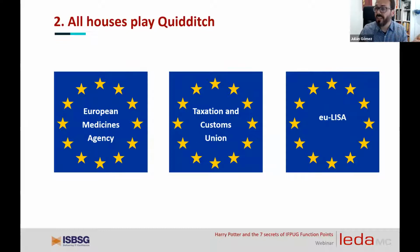I remember, last year or maybe 2018, that in all those tenders, function points are used in a different way in each one, but they are used for three main things. The first one is to calculate the value of the project, to make the estimation of the project. The second one is to select the best provider, the best supplier, to do the development project. And the third one is to calculate the quality indicators, the KPIs, because quality is measured by defects per function point. That shows you the importance and the practical way to use that methodology, which is taken into account in the European Commission.